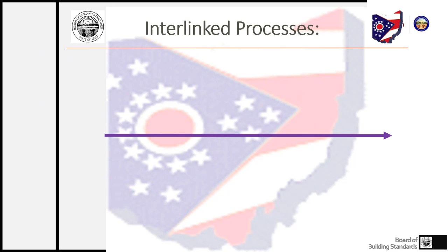So he's got this idea, he's going to hire a designer, he gets that design down. Now what does he have to do? The law says he needs to get approvals both to start construction and to occupy that building. So to get those approvals, he needs to be looking at the building departments and the rules of the board and enforcement of building codes.